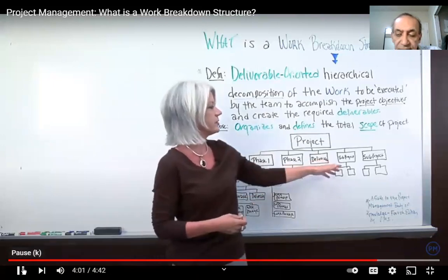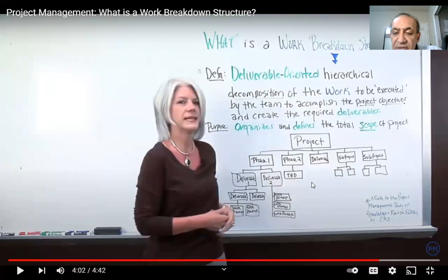Again, this can continue to be broken down. And like you see here, it doesn't mean that all levels have to be symmetric when the task is broken down. No, it depends on the type of the activity or the object which you are going to divide into subtasks or sub-objects. So it depends on the type of task itself, whether it can be subdivided more or not.